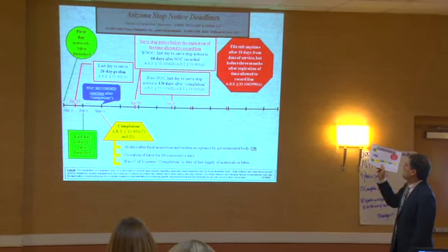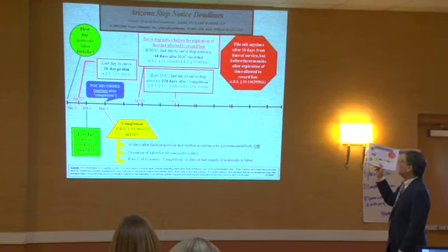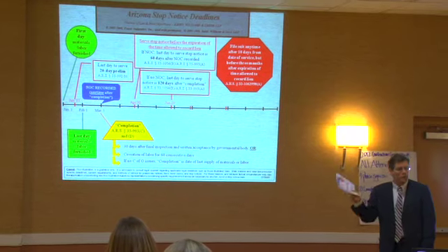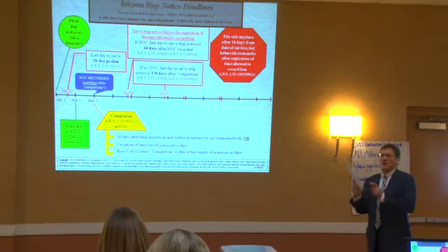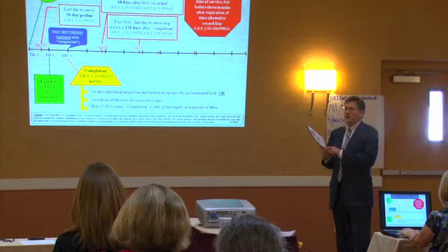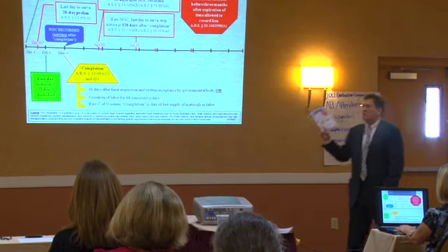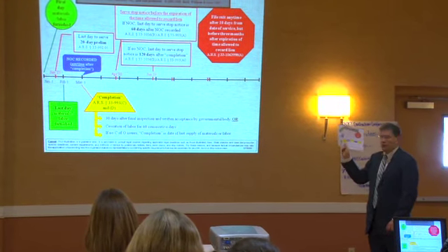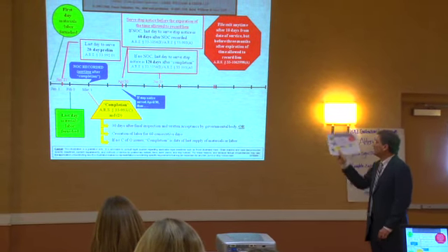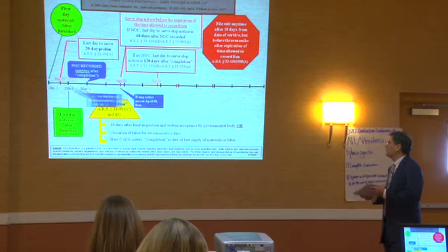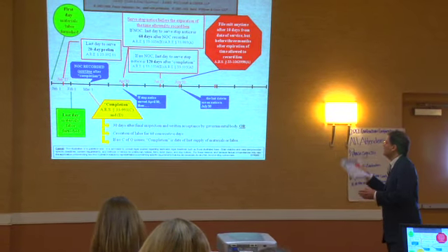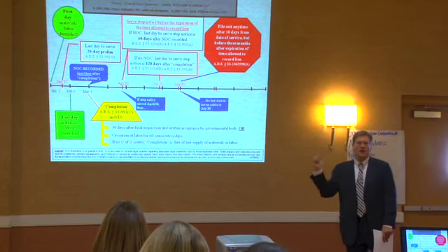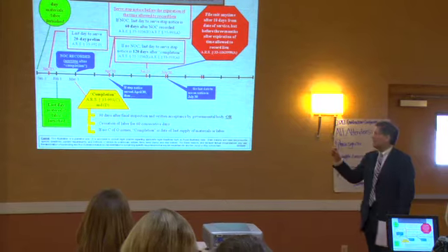You can file suit anytime after 10 days from the date of service, but before 3 months after expiration of time allowed to record the lien. 3 months, not 6. A lien claim, you have 6 months to sue and foreclose it from the date the lien is recorded. A stop notice, you have 3 months to sue on this after the stop notice is served. Okay? So, hypothetically, if the stop notice is served April 30th, then the last day to sue on the notice is July 30th. 3 months, not 90 days. On the lien claim side, 6 months, not 180 days.